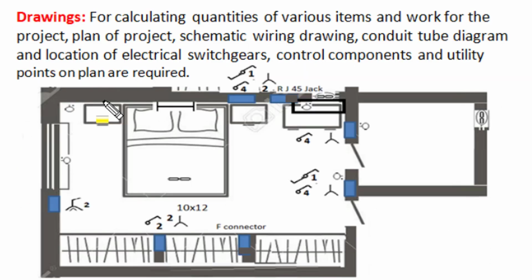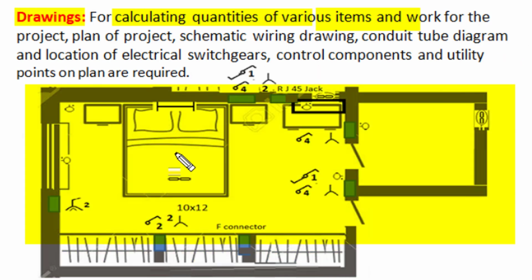In all engineering works, whether they are civil construction, mechanical assemblies or electrical installations, drawings are used as a language to express details of project to be executed. For electrical installation work, to calculate quantities of various items and work to be performed for the project, we need a plan layout of project with all necessary details and dimensions.